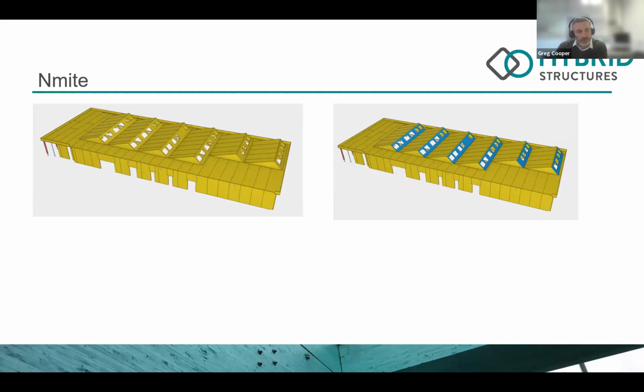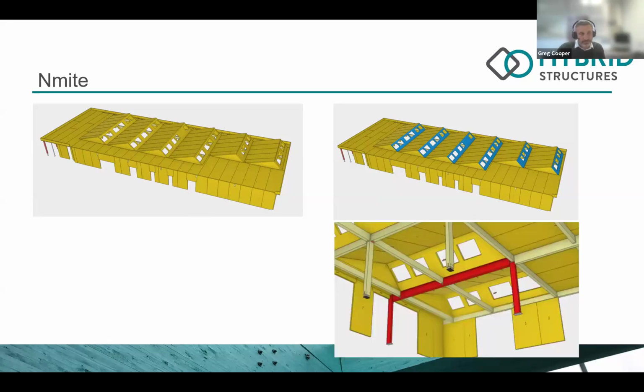If those panels had been, say, 10 or maybe 20 millimetres bigger in length, we would have needed tens of thousands of pounds of temporary works to install them, a significant amount of screws, and strengthening items to get the whole thing to work. But through collaboration, on the angle of the windows and how things all work together, we were able to influence the design to how it is. The little bits in blue between the windows, which didn't match the photos you've seen before, were cut out afterwards. They were removed; they were transport pieces that were put out locally. But as I said, it meant a quicker, faster build.